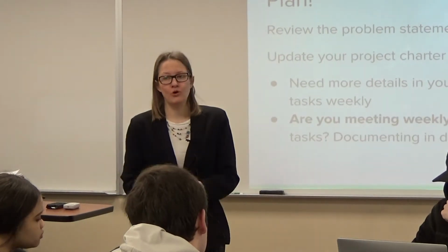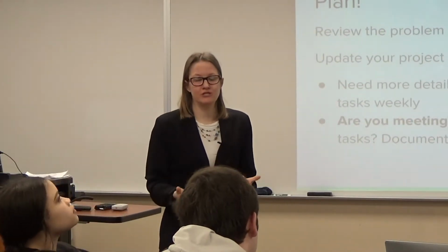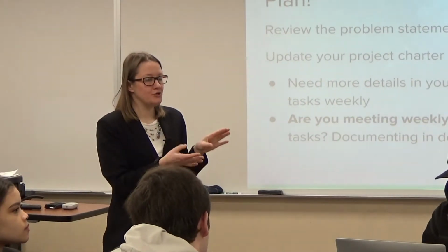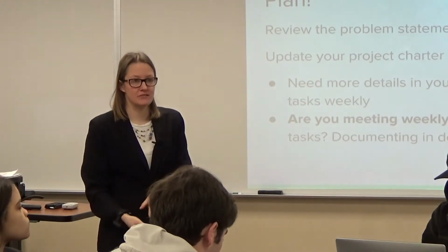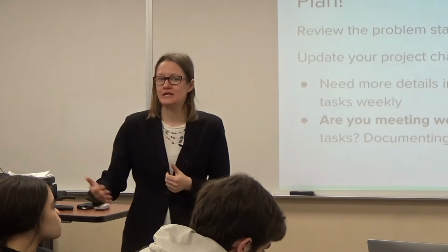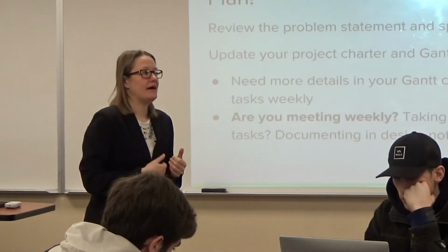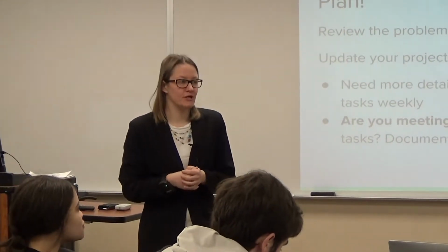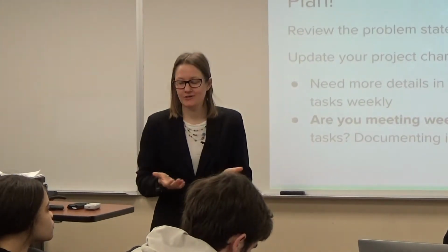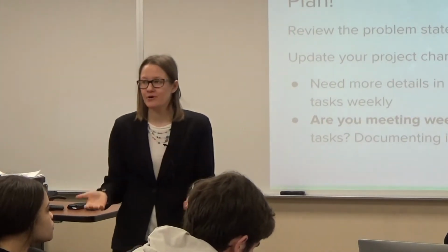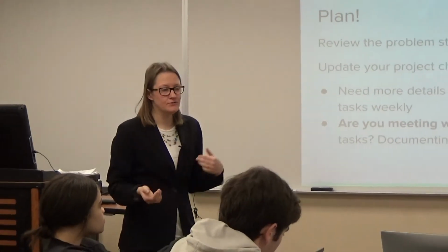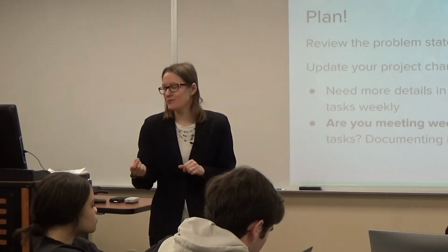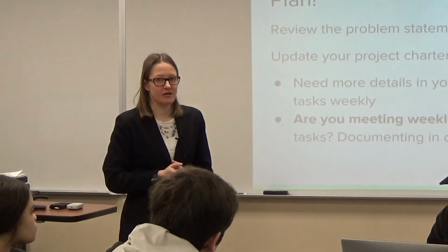You'll be able to put in more and more details now that you know what your solution is going to be. Especially if you've done functional decomposition, you can break up your project solution and what you need to do into different parts and start assigning people to those things so that each week you're all working on different things and trying to accomplish them. It's really hard to make a very detailed Gantt chart before you know what your solution is going to look like, right? You don't know if you're going to be building something or just designing a process or what really is going to go into that solution. So now you can put in some of those details. So this is part of the iterate part of your process as well. You're going to update some of your stuff.